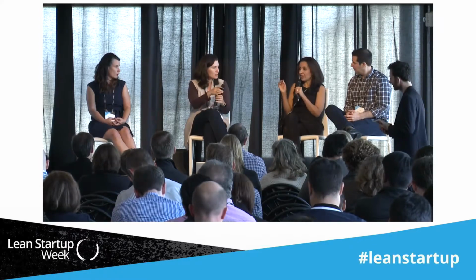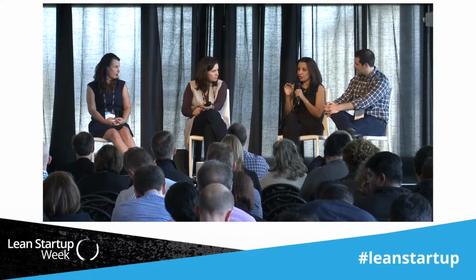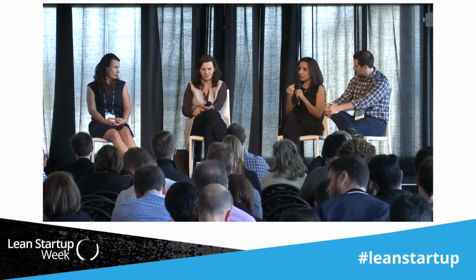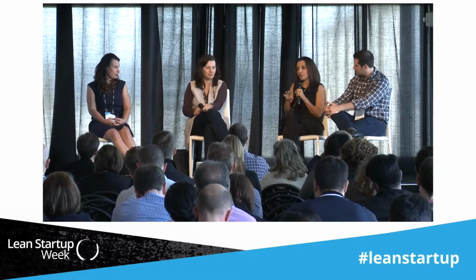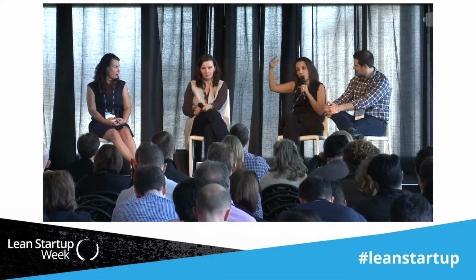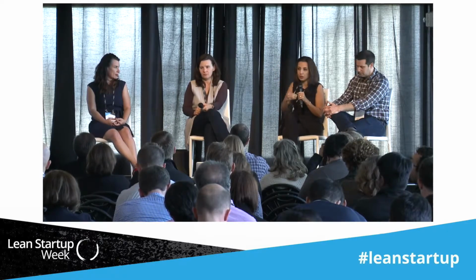Yeah, the only thing I'll add, when we were describing these tasks, and Shawna and Tatyana covered it, is we started with the smallest piece first. Think about a Lego. We started with the smallest block first, and then we built on it. And this diagram says, what is the quick thing they do? They send an email, right? So let's design that experience. And then we went on and said, now they want to manage an opportunity. Now email is part of it, meeting is part of it. So we really built on it. It was kind of a Lego for us.